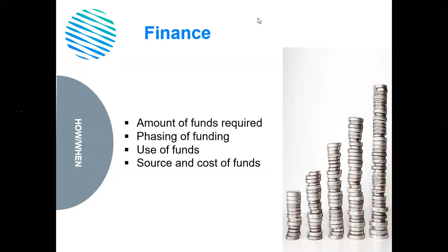It may also be possible to reduce capital required in other ways, for example, by starting with cheaper temporary facilities and only installing permanent facilities once production revenues are being generated that can pay for them. So there are various different elements like that that can help you to tweak how much capital you need in total.